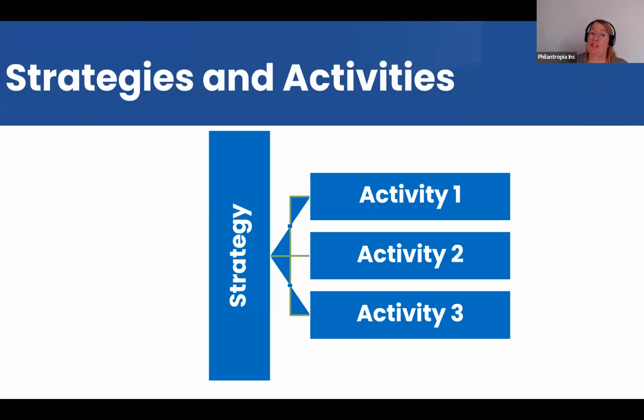The thing they want to achieve with their project is not just implementing that activity, it is that teachers are trained and better equipped to deal with students' problems or whatever it might be. So keeping those 2 apart, the activities and the objectives, is key to writing a good and structured proposal. And if you can do that, you're already 10 steps ahead of most people.